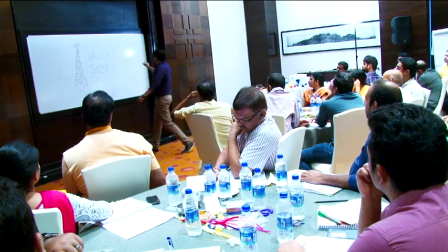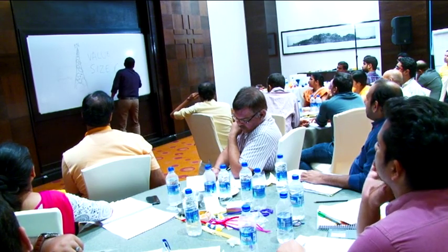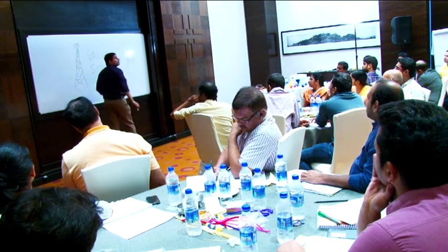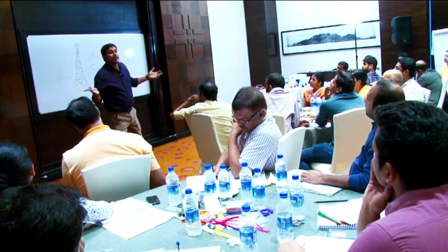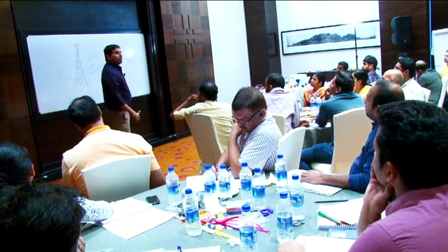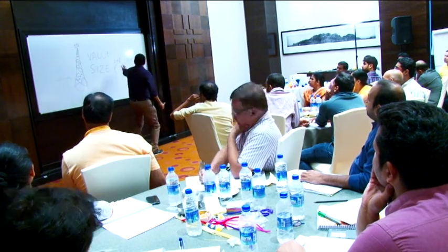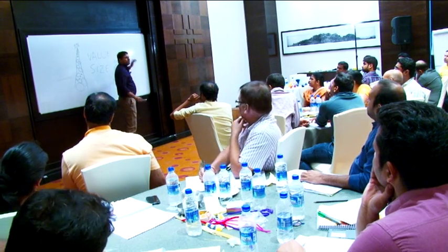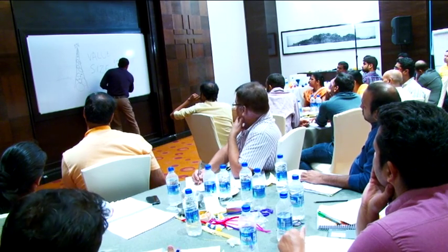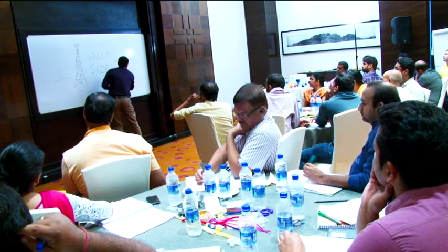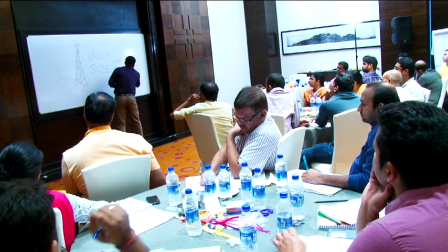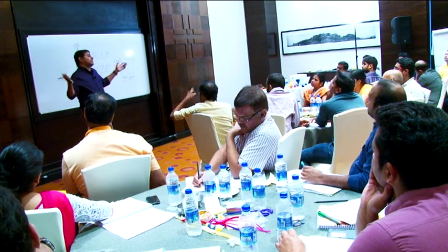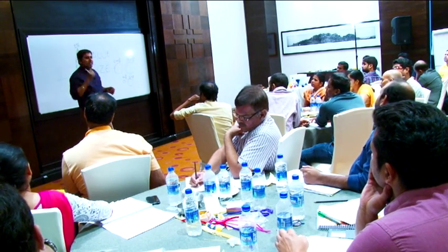Okay, I may have the same size, $200, $700. Which one will you pick up? Why? This is size, this is value. So same size, different value, right? Same value, different size. Which one will you pick up? Why? It can be done faster, our highest priority, same thing, right?